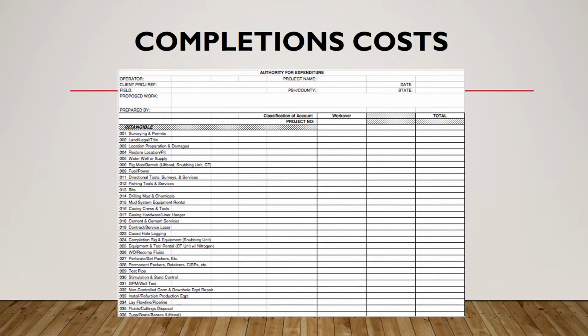In order for us to come up with a cost estimate for our well, we are currently working on filling out an authorization for expenditure form, or AFE, which is shown. An AFE is a budgeting and approval form that will allow us to estimate our total drilling expenditures and later compare them to the actual cost at the end of the project.